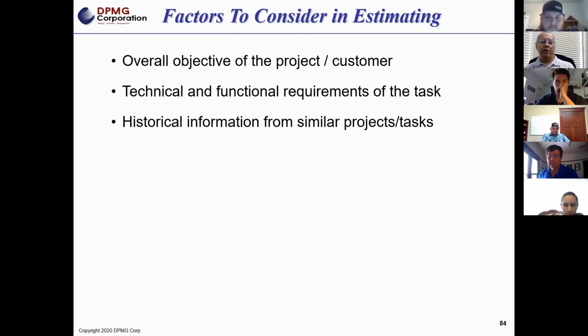Oh, I want to go back to the customer piece. One of the things that we do too, and there are other organizations that do, in my past life, when a particular consultant was involved on a particular project, we always knew that we had to add what was called a grief factor, because there are certain customers that are very difficult to work with, and they have extensive requirements or require a lot of hand-holding through their process.